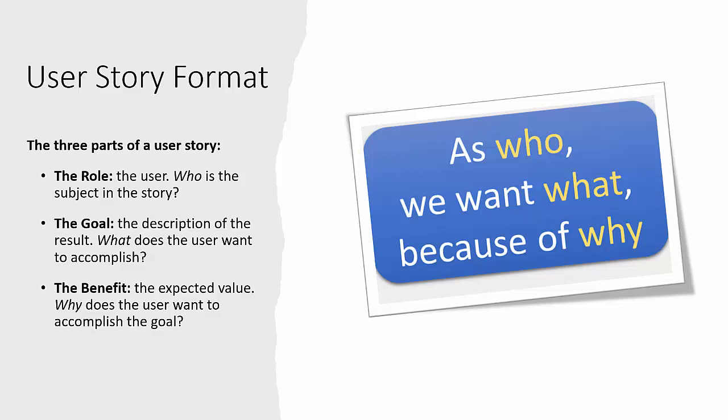The role, who is the owner of the story? The goal, what is it that they want to accomplish? And the benefit, why is it that they want this goal? So these are the stories, the user stories. And we'll be breaking these down into tasks in order to then know what to do and what to perform.